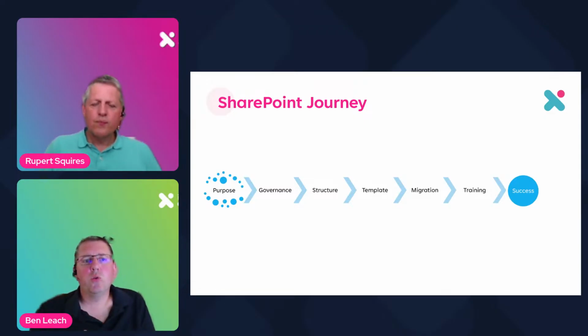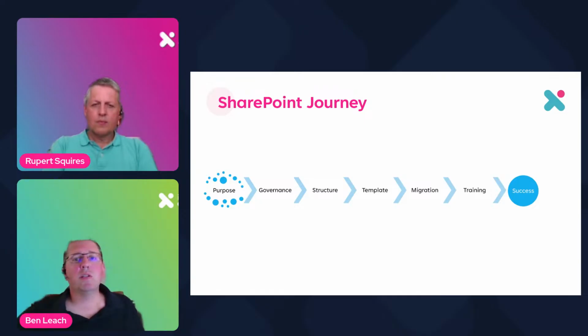And then, although we talked about training happening before your migration weekend, you need to be planning your migration well in advance, because you need to be looking at the data and the structures and that information that needs to be brought over, and using that as an opportunity to archive off data or even remove data that's no longer relevant. So you've got everything set up. You then start to plan your migration. 2 weeks before you're going live, you're getting your training and making sure everyone's trained, and then you've gone live and you're handing over into ongoing success to keep it fresh.